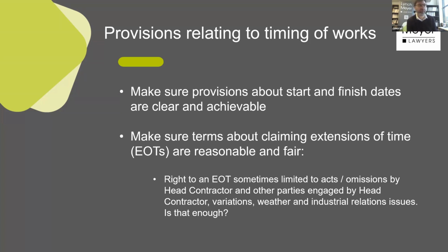You might get a purchase order or something that says, I need to do X, you need to do X, Y, and Z, and there's no great focus on when the works are to start or when the works are to finish. Now, in that case, as a matter of law, the law will determine that there is an end date. And what that end date is will be determined by the court based on what is reasonable. Now, what does that mean? It means whatever a judge who knows very little about the welding industry decides it should take to do welding work. So it's very unclear, grey area.